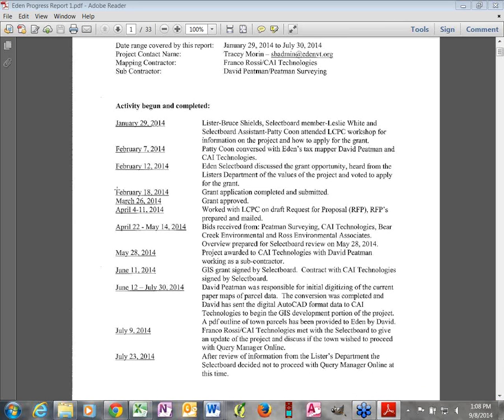She also included stuff that happened before the technical start of the grant period, before the date that the contract identifies as the grant period, which is fine, but I do want to be clear that stuff that happens before the date identified as the beginning of the project on the contract won't be either reimbursed or counted as in-kind activity.